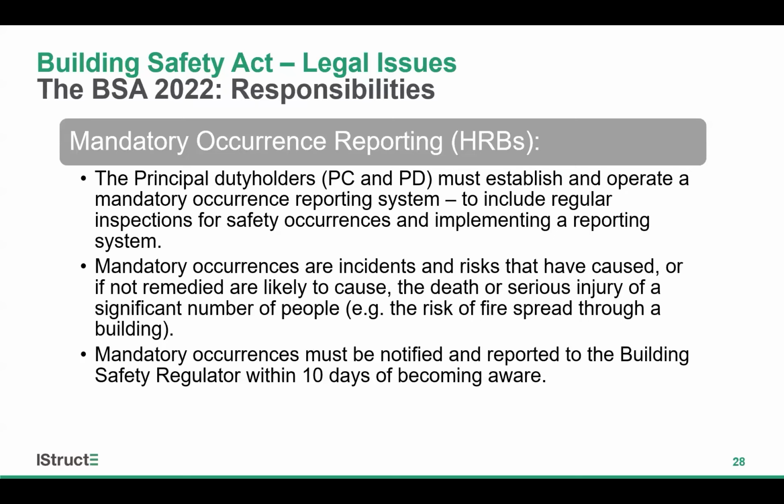Examples of such would be if you became aware of a non-compliant product being used, or inappropriate or incorrect installation of products or materials, or the realisation that there may be a design flaw. And of course, the process is designed to encourage proactivity and transparency and to prevent people from covering things up and to hold those accountable. So in the example of Grenfell, we all know that it has become apparent that numerous companies and individuals knew of issues but kept quiet about them and didn't do anything about it.